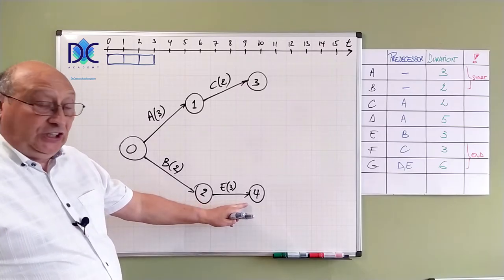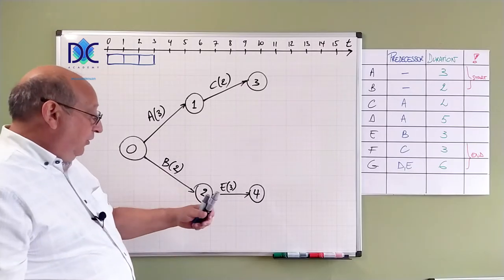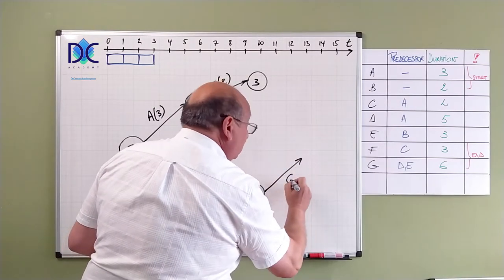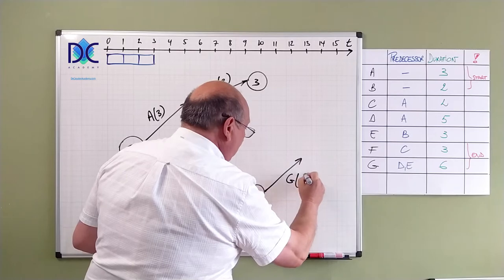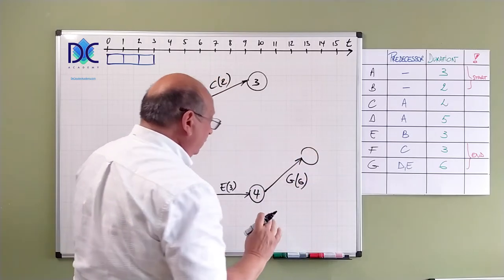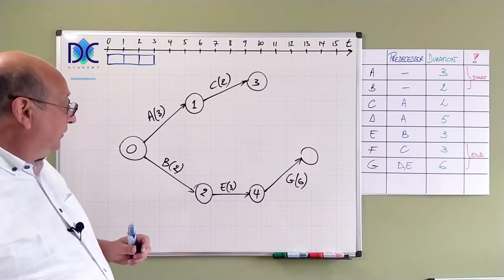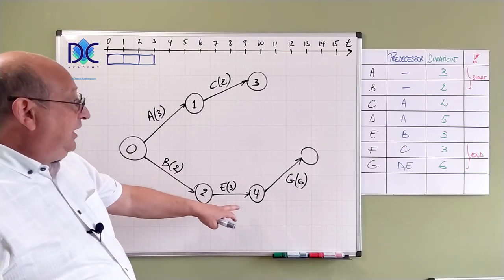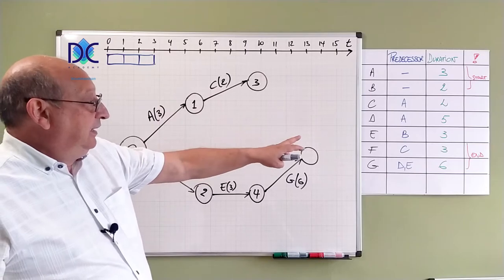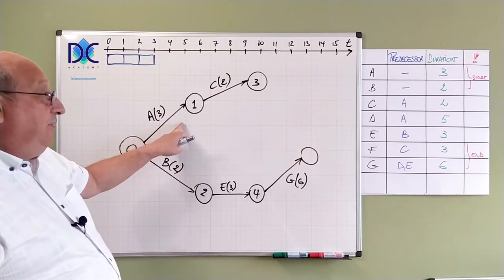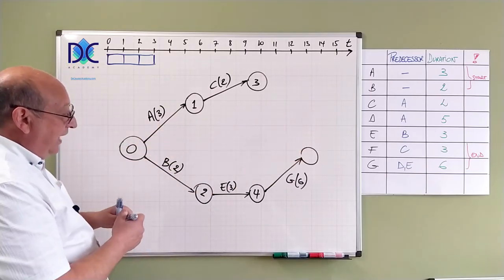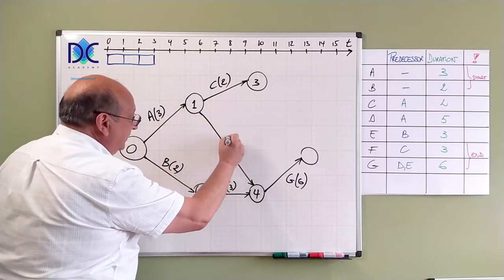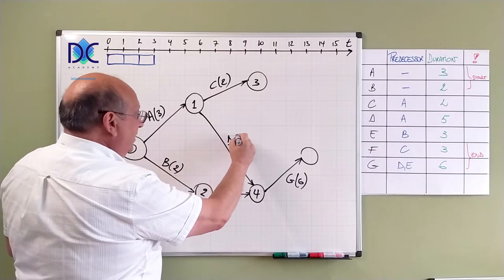After E we have G. So G is one of those activities at the end of the project. So G has a duration of six and I put a note here. I don't put a number in there yet. Now we also know that G is after D and D is after A. So what I do now I put activity D here. D with a duration of five.